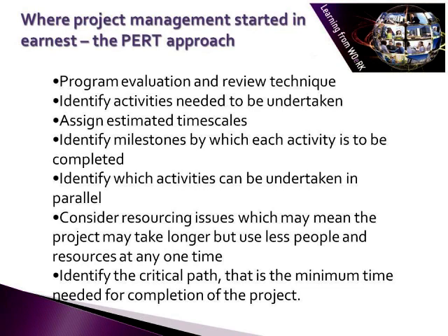One of the basic elements of all project management is to identify the tasks and activities which must be undertaken in order for the project to be completed. We then need to assign timescales to these activities and see which ones can be operated in parallel. However, by running several activities in parallel, a problem can occur in terms of resourcing, and this has to be taken into consideration. In simple projects, this can be explored manually. However, with more complex projects, it's usually more effective to use a computer-based project management program, such as Microsoft Project.